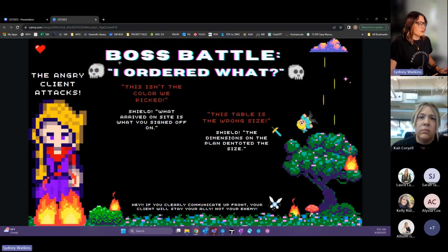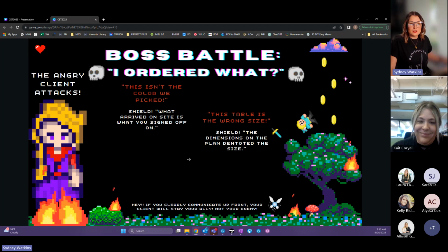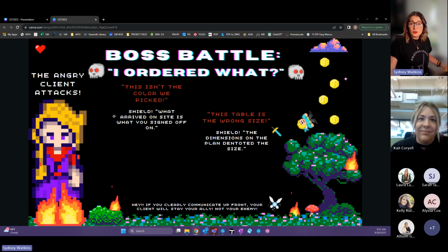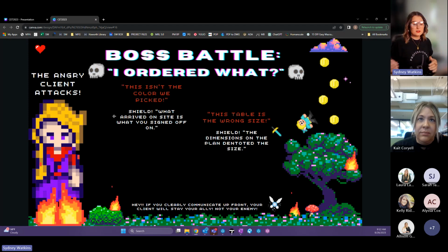So here's our first boss battle. The angry client shows up. This is when everything shows up on site. Client goes for a walkthrough and they're like, this isn't the color that I picked. Well, you got a shield for that. You pull up your sign-off sheet with all of those finish codes. We're like, yep, it's right here. You signed off on this. If you want us to change the color, that'll be an additional cost.